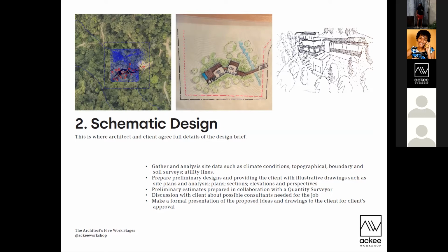So they don't need to be 100% accurate. I mean, they should be drawn somewhat to scale, but they're just simple illustrations for the client to get a visual and a feel of what the space and the project is about. We're also going to start to bring in or talk about different consultants that the project might need, maybe different engineers, whether that be structural, sound, fire, and even quantity surveyors to be able to give us budgets for this project. All right, so that wraps up schematic design. At the end, you should get a package of basically sections, elevations, plans, perspectives, and understanding of your site analysis and consultants.